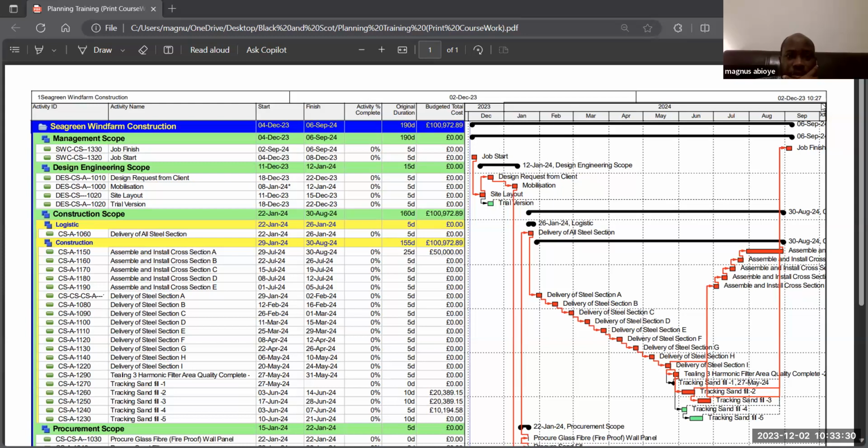Yes, that's true. When you dissolve an activity, you more or less cannot undo it again. But the advantage of dissolving an activity is this: there is the preceding activity and the succeeding activity of the one you want to dissolve. When you dissolve that activity, it merges those two, it connects those two together. It creates an automatic relationship.